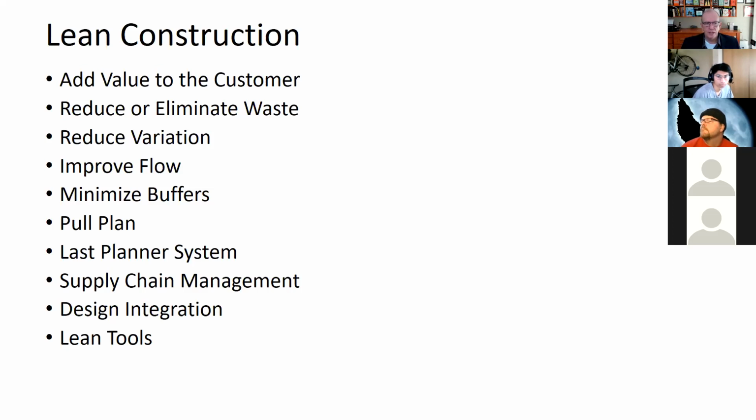But that's not the reason Lean does it. Lean does it more from the customer perspective. I'm the last person on the last task. What do I need to have done to start this task? Well, I need to have the drywall taped. I need to have the baseboard on. What do I need to start painting, right? And so then you're looking, okay, what comes prior to that? And you just work it backwards.